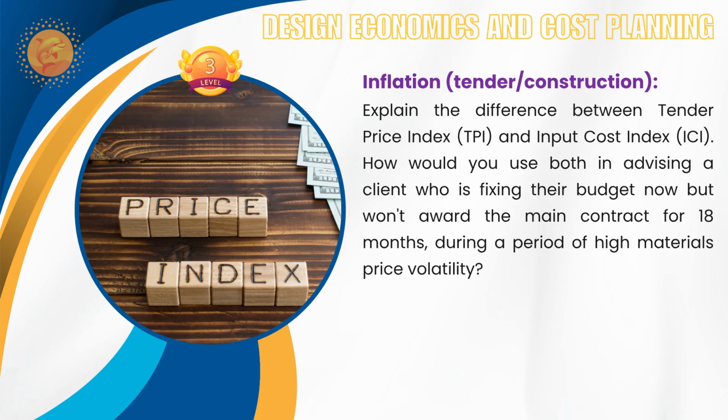It cannot be clearly justified because it is market movement. It is based on the sentimental condition in the market during that period. If you are in a boom, yes, they try to take advantage, because they are not in a hurry to take up the work. They have so many works in hand, and only if it comes within a considerably higher markup will they take it.